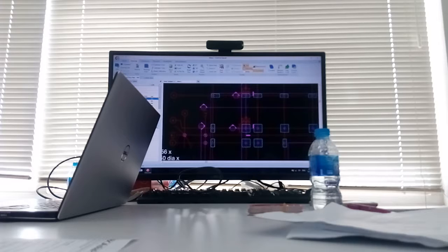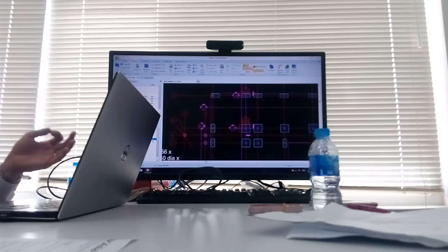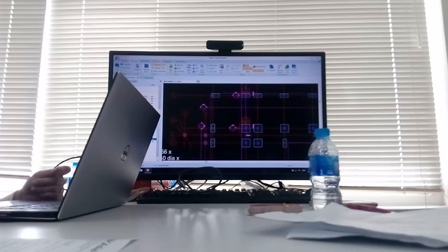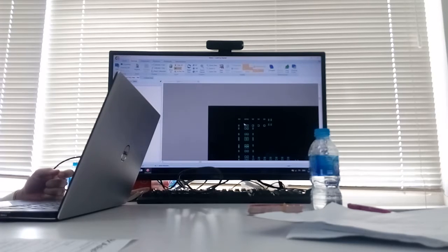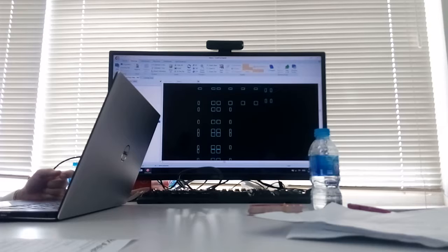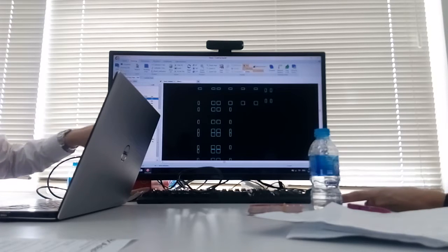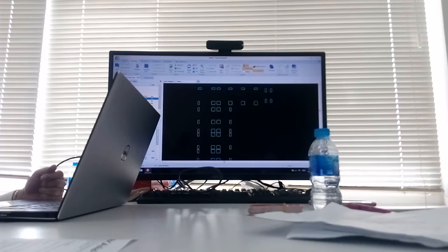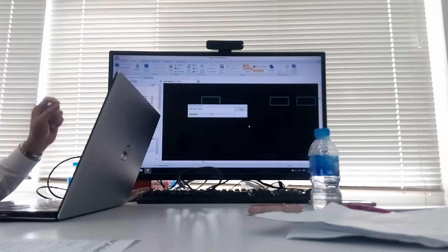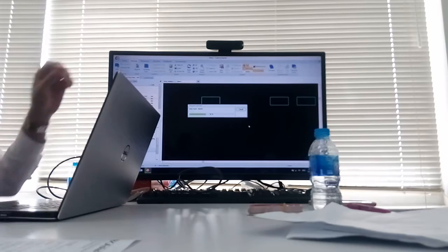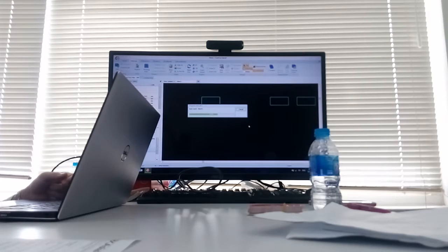Inside the PDF file, let's say I put under this file cap. When it's a vector PDF, you can filter them according to the layers. To hide the layers, I invert. There are so many other file caps. We have one auto count function here. With this auto count, you can first capture, so I can capture this image of my file cap. Then I click search, and the software, based on the image I highlighted, searches throughout the whole drawings.